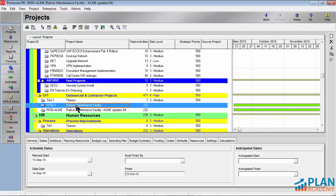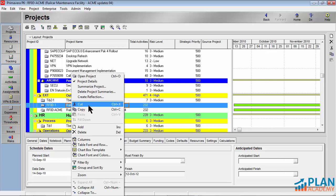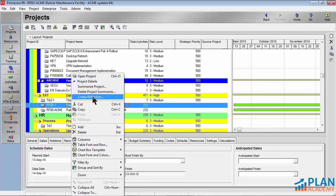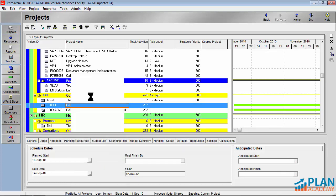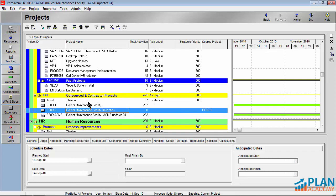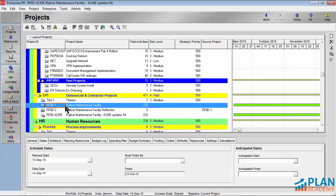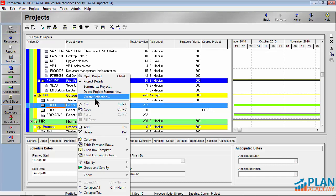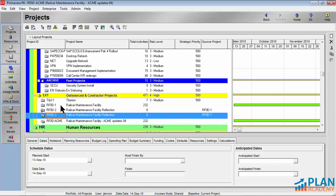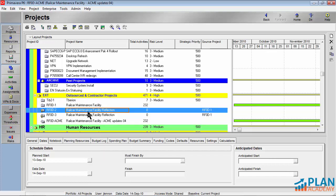Let's start by creating reflections. Right click on your project and choose create reflection. Primavera does a little bit of thinking. You can see it's created my rail car maintenance facility reflection. It's called RF zero D dash two, and you can see it's a what if project. We're going to create another reflection, the same project.